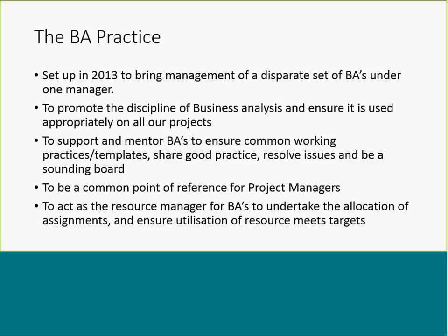So there was also a common point of reference for project managers. That was a bit of a challenge for them. They needed to come to me to get resource for projects, before you collar somebody in the kitchen, perhaps, and before you knew it, they were working on their project. So they started coming to me. I was the resource manager for the whole team, and I have to allocate the people on assignments, and also manage utilisation targets, because we do charge them from our capital plan, and all our project resources do timesheets each week.